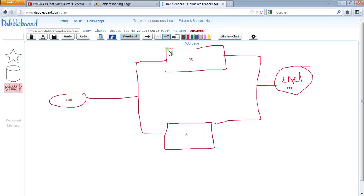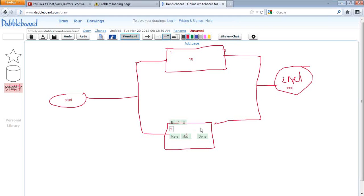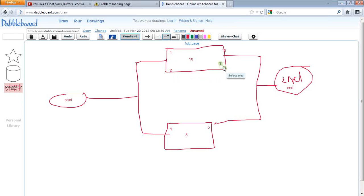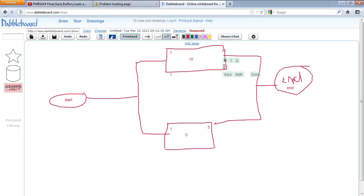If I start Activity A on day one, it will get over on day ten. If I start it on day two, it becomes day eleven — the project will slip. So for Activity A, I necessarily have to start on day one and complete it on day ten. There is nothing negotiable there.